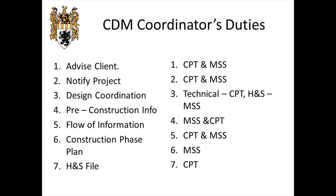The construction phase plan is prepared by Laing O'Rourke — the principal contractor — and the CDM coordinator's job is to make sure it's adequate, suitable, and sufficient for this job. They gave it to me to look at and it only took about three weeks to work my way through it. You have to read everything you're given, particularly on health and safety — don't just scan it or read the contents page or executive summary, you have to go through the whole lot. I'll show you why in a bit.